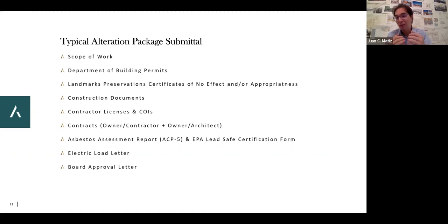And my job is also to sometimes help advise safely to find little ways to get a little bit of a buffer zone at the beginning of a timeframe, a little bit at the end of the timeframe, all proper. If one can strip down curtains and take down things that are cosmetic and start getting debris out and not trigger your permit, that means you aren't doing construction, but at least we're getting a week's worth of work that saves us on the end. The timeframes for alterations are really important to protect everybody, but it's also something that shareholders should always take really serious note of.